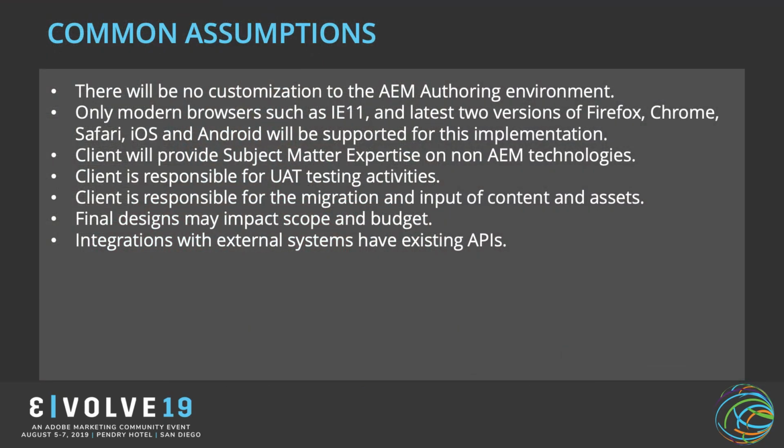Assumptions are key also to make sure that everyone is aligned with what you're trying to do and what things we need to assume are X or Y. These are some common assumptions we put on projects. So one, just right off the gate, we don't recommend customizing the AEM authoring environment. So if you don't like the way Adobe has made the authoring environment look and feel and you want to brand it and change the colors and change where everything is, we really recommend limiting that. So this is a common assumption that we like to make because it's going to make upgrades more painful. And at the end of the day, you bought the tool and this is what your authors need to use.